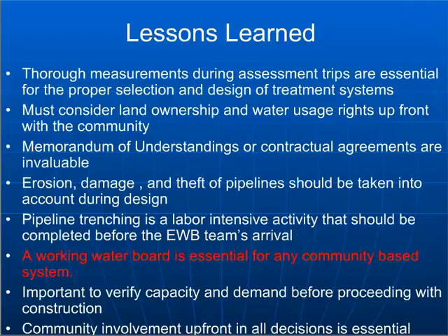A few lessons learned. The assessment trip is obviously a very important part of the water distribution system process. Depending on your chapter's experience with water distribution systems, and the community's experience with them, it's very likely that multiple assessment trips would be required. It's hard for me to imagine a chapter going on a 5-day assessment trip and collecting some data, coming back to the U.S., designing a system,